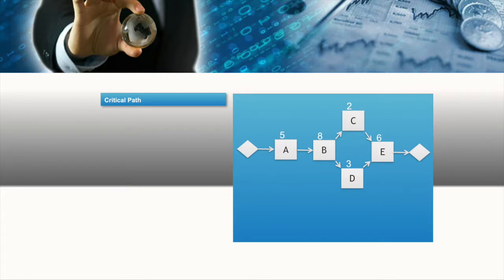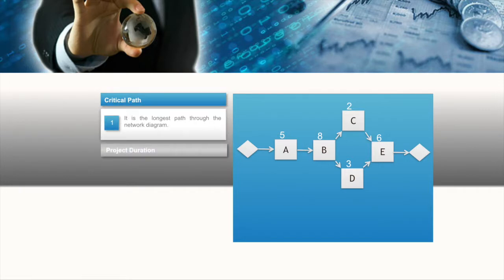You can see on the right side how the project network diagram will look. Instead of having all of your activities in a list, once you sequence your activities, you will end up with this network diagram, which is on the right side of the screen. And based on this network diagram, you will determine the critical path of the project. The critical path of the project is only possible to calculate once you have the project network diagram.